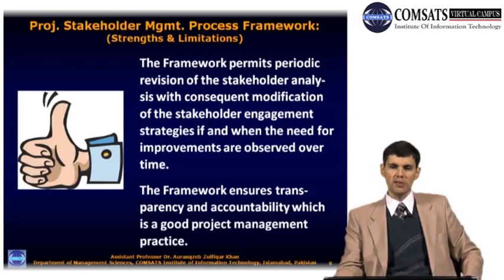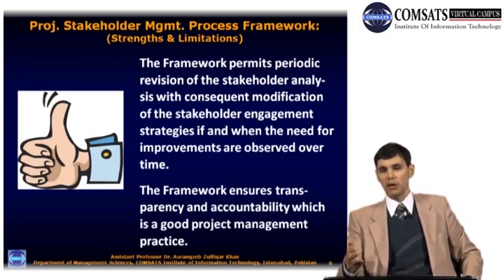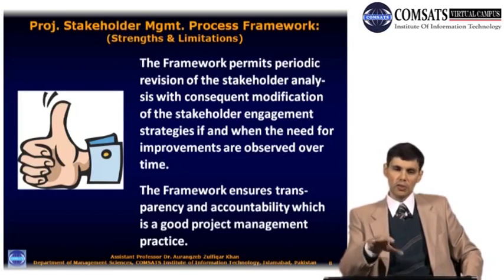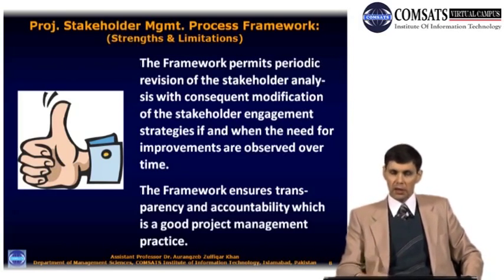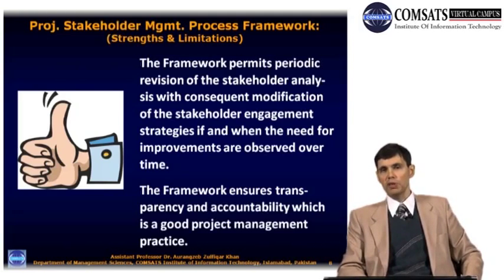So what this basically says is that you have to periodically review the identification of your stakeholders, the community, the analysis, their impact evaluation, and your engagement and management strategies. It doesn't mean that it must be done, but if there is a need, which one can observe by collecting information on stakeholders and by observing them, which is also part of the framework, then there is a need to redo the analysis, the strategy design and the implementation.